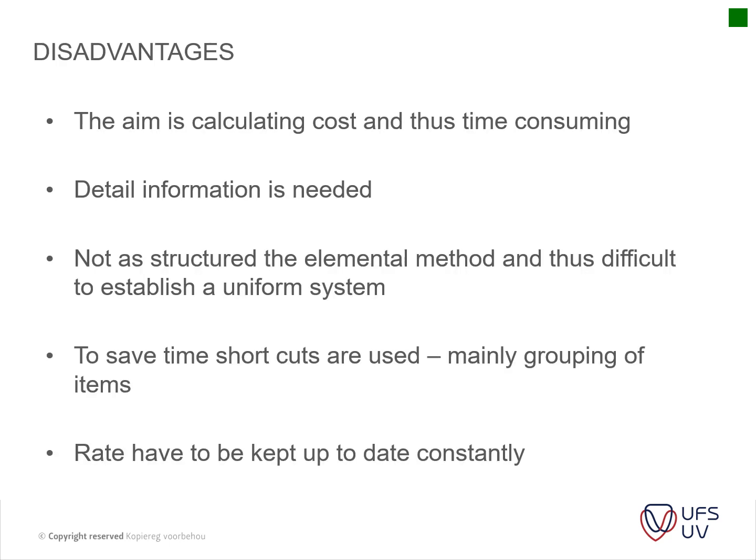Okay, so the disadvantages: the aim is calculating cost and thus time consuming. Detailed information is needed, not as structured as the elemental method, and thus difficult to establish a uniform system. To save time, shortcuts are used, mainly grouping of items. Rates have to be kept up to date constantly. Yes, so these are the disadvantages of this.